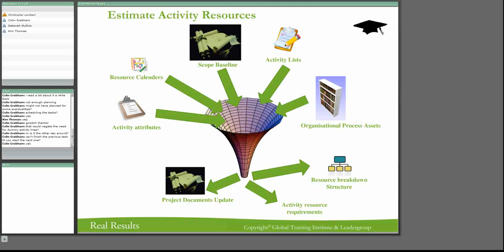So if you were going to build a building that required a particular amount of cold rolled steel and you couldn't get it because the supplier couldn't supply it to you until a particular time, resources are going to have constraints. That's why you would have an activity attribute list, because it would say, well, I need this resource for this activity, and it's not available until this date. So resource calendars and resource attribute lists, that's what we're talking about here. All right, now we get to the next one.